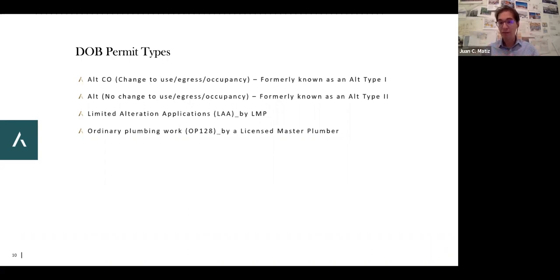You'd have to pay fees. You have to prepare paperwork, submit those two renovations to your building for the architects and engineers to review them, go through that entire process, the agreement. So one wall moving and an entire apartment being gutted, the same process.